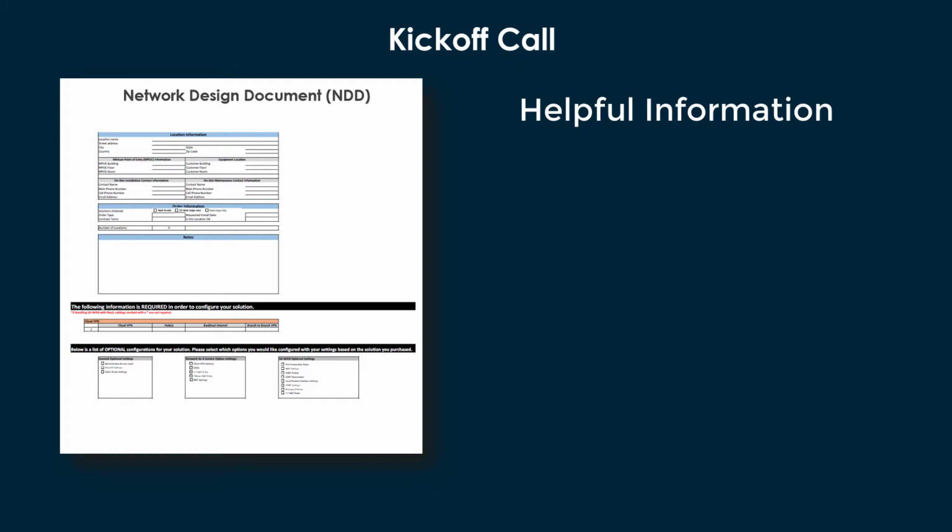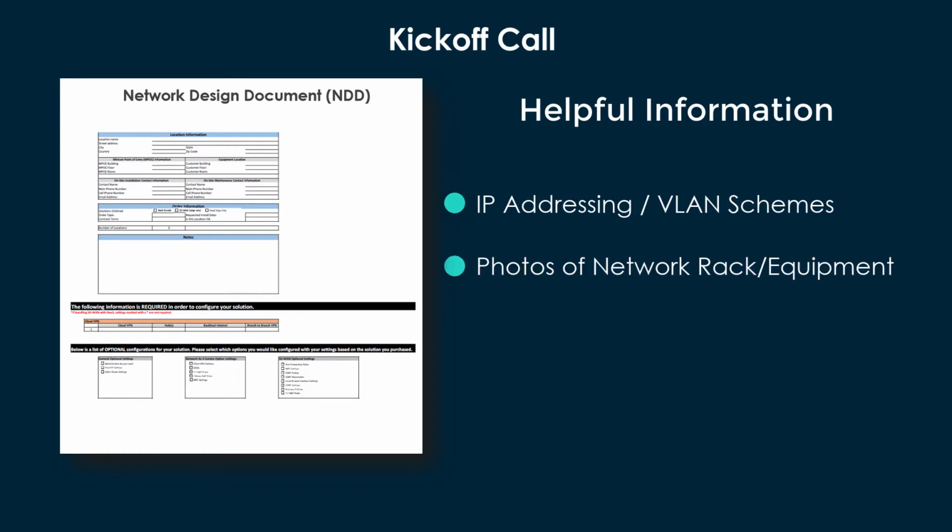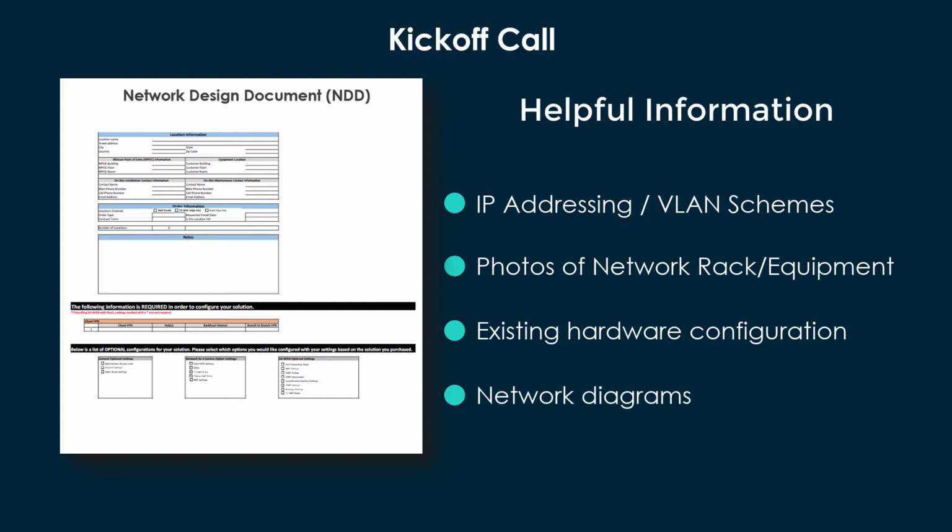In order to better prepare for reviewing the NDD, it is recommended that you have the following information available during the kickoff call: IP addressing and VLAN schemes. Photographs of your current network rack or any existing network equipment is crucial in preparing our technicians for the day of your install. Any currently running configuration from existing hardware that CBTS would need to be aware of, and any available network diagrams.